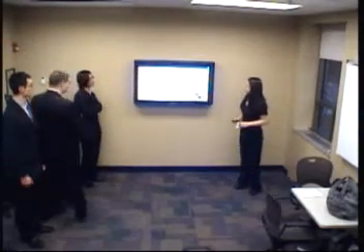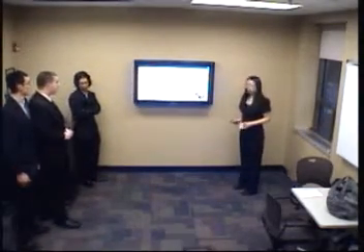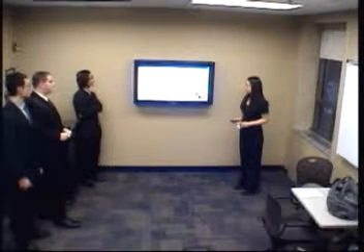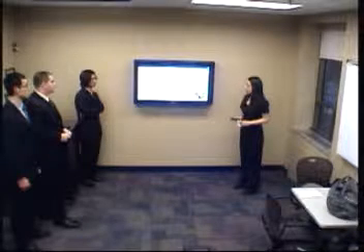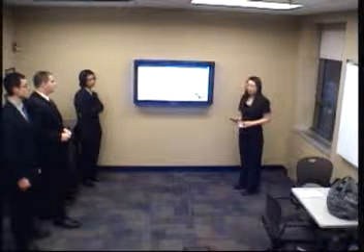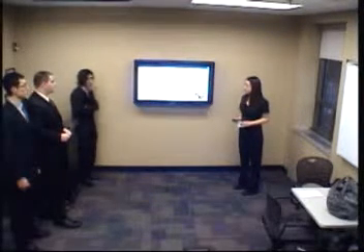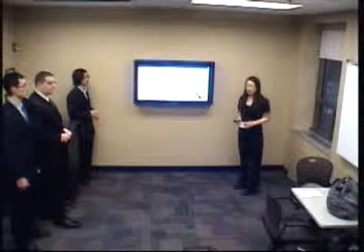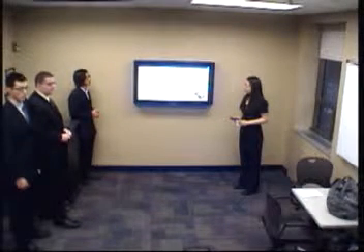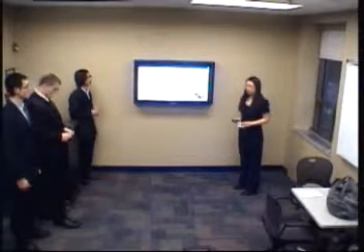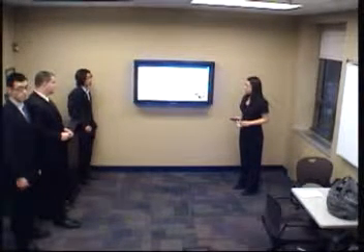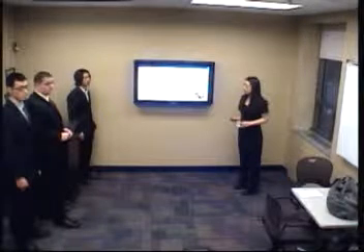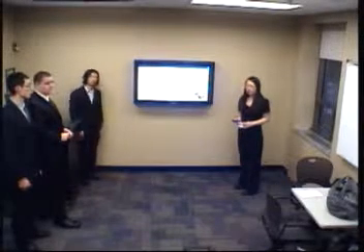So the first risk we are dealing with is late delivery of work. All of our assumptions are based on estimates. That means we might have to spend some more time on some tasks. The late delivery of work is associated with extra cost. The plan for this is to plan for extra time when we're dealing with some tough tasks.